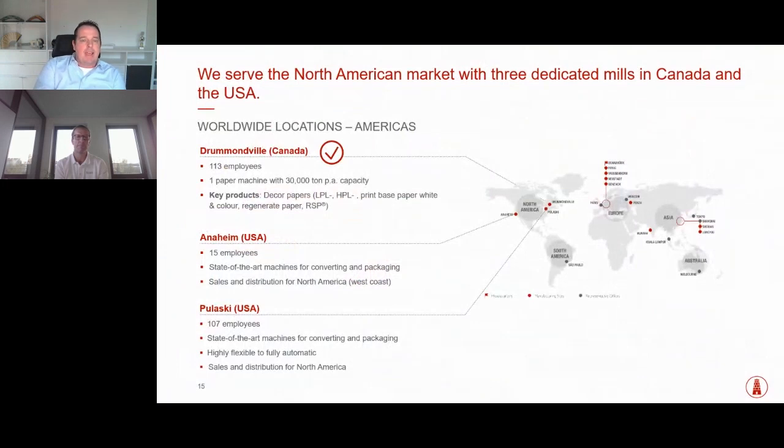Thank you, Reinhard. As I mentioned, we decided to split our EASY North America project, based on the decision that we want to reduce the complexity. The original plan, after the go-live in Germany in mid 2019, was that we would go live in our 3 North American mills at the same time, which would have meant that Drummondville, Anaheim, and Pulaski, which you see here on the left side, would have to go live together. But there was a clear decision that we need to reduce complexity to be able to handle these kinds of projects.